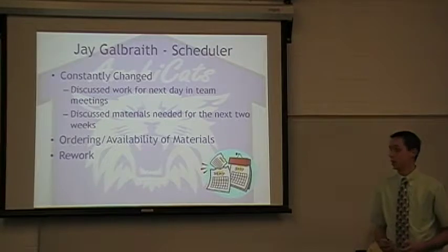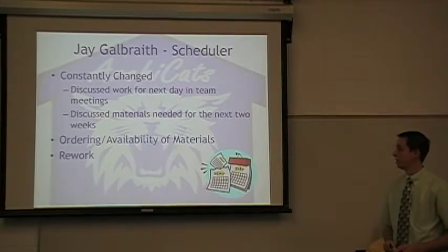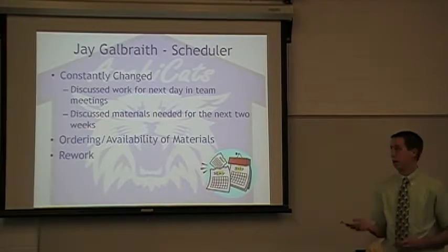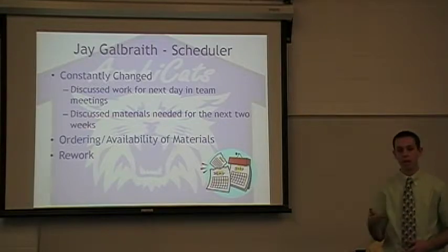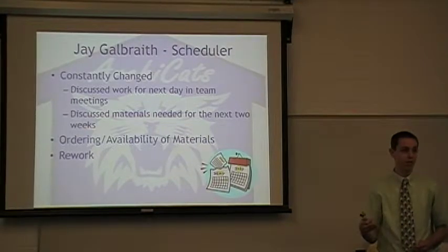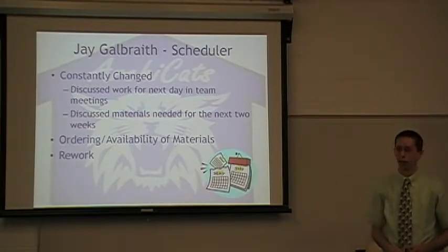As any project goes, I'm sure the schedule changes, and that happened with ours. What made it a lot easier was that every Tuesday we had our weekly meeting, and we would discuss what we were going to do for the next day, and also talk about what materials we would need for that day if we didn't have them, and also for the following weeks. We were always trying to stay one week ahead of what we were going to do.